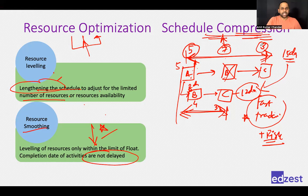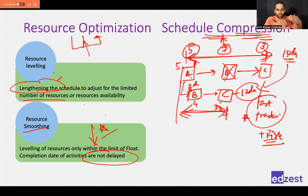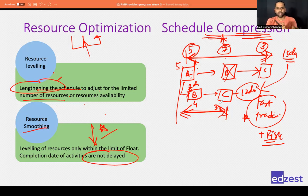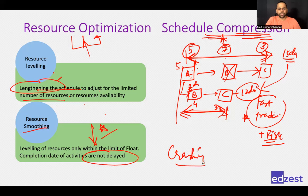The second schedule compression technique is crashing. If you cannot fast-track — for example, you must lay the concrete floor, wait for it to set, then work on the wall — there is a technical mandatory dependency that prevents parallel work. In that case, you add more resources: instead of two people pouring concrete, use four people so you finish it faster. Crashing means adding more resources to complete an activity faster.